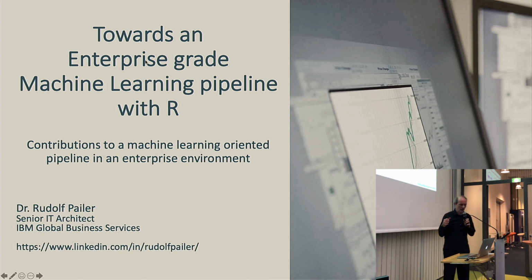That's the CRISP-ML model. It describes the connection between business and data science, not only in the steps but also in more depth. It describes which documents have to be provided at which stage, which people you need at which stage, what deliverables have to be constructed, and also how you make sure that the progress of the project follows certain parameters. At each stage in the project, you define what makes the project successful or not. So this is more or less a way of living the data science project.